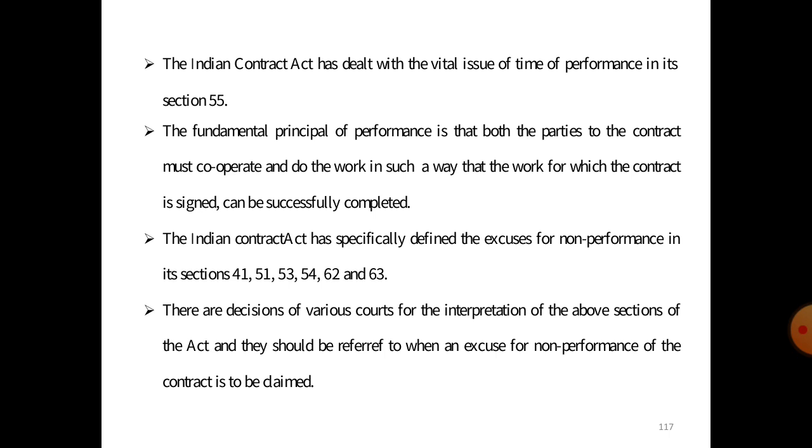And the Indian Contract Act has specifically defined the excuse for non-performance in sections 41, 51, 53, 54, 62 and 63. Now there are decisions of various courts for the interpretation of the above sections of the Act, and they should be referred to when an excuse of non-performance of the contract is to be deemed.